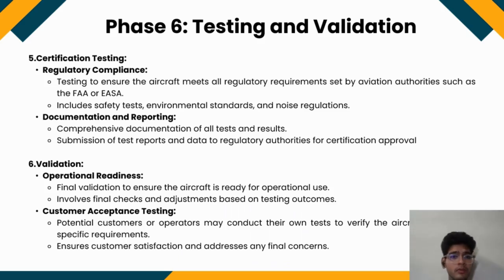After all these, we have certification testing. Certification testing ensures regulatory compliance. The aircraft is tested to meet all requirements set by the various authorities, such as the FAA or EASA. This includes safety tests, environmental standards, noise regulations, and comprehensive documentation of all tests and results, and they are submitted for certification approval.